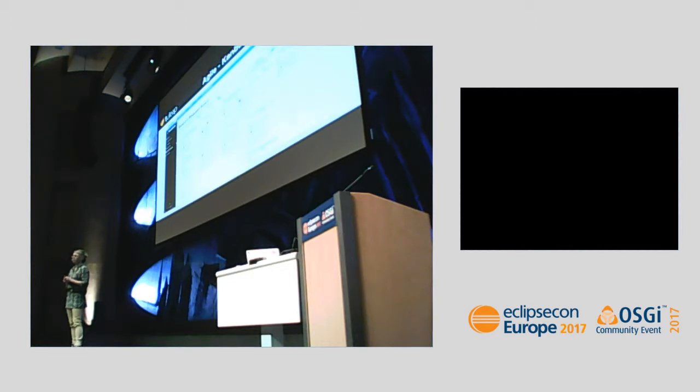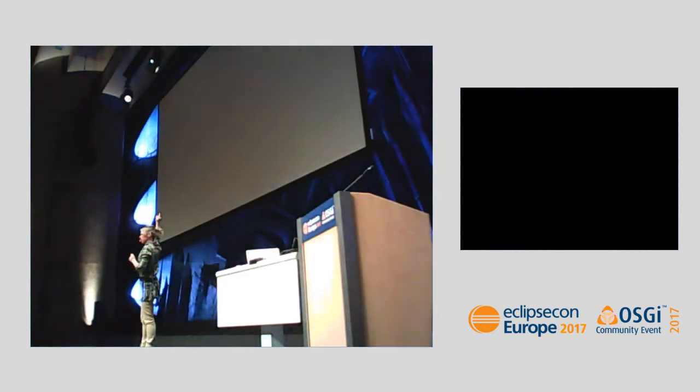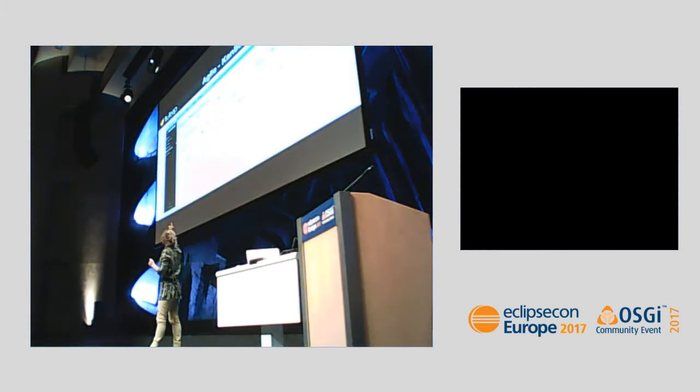In the pure Kanban from Japan, this methodology has to streamline your workflow, has to help you finish things. So behind this simple board, there is a workflow you have configured. What's a workflow? It will help you to focus on work in progress in order to make things go very rapidly from the left to the right. So here in the example, you have a work in progress column.